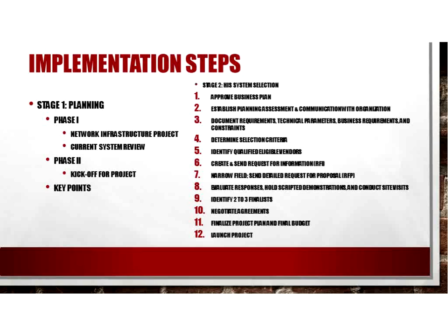An organization does not want to sign a standard agreement from a software vendor because it's going to commit their organization to paying for the entire system. Instead, what they want to do is to create an agreement that's based on a milestone payment structure, and basically what that essentially is saying is your payment for that vendor is going to be based on a passage of time in which the health organization is going to pay for, say, 50% of that system when they sign the contract.